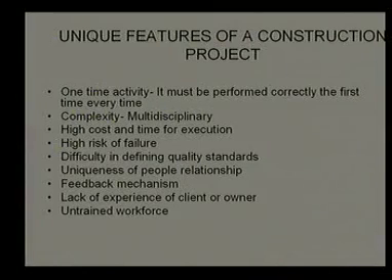So, every time there would be change orders. Now, the more the change orders, you will find working becomes quite difficult. You will not be able to set a target, you may not be aware of the final cost that the project is going to take, and under such conditions project management becomes very difficult.